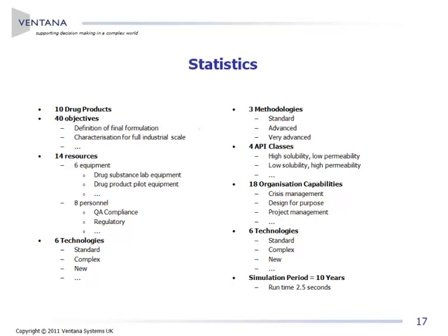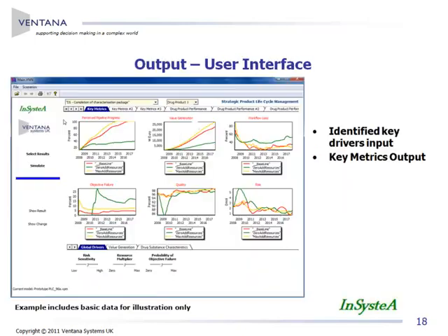I think you might have realised possibly that there's a stochastic element to this because we are looking at probability of failure at each point at the end of each objective, and so we have to run the simulation thousands of times to get a decent analysis.